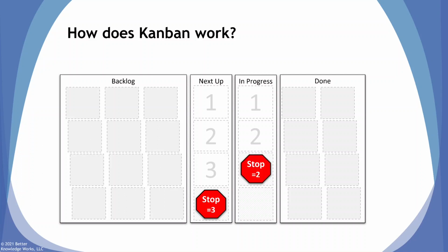We'll also limit the number of tasks the team can take on at any one time. Here we're saying it's 2. And that's what helps us eliminate or reduce at least multitasking.